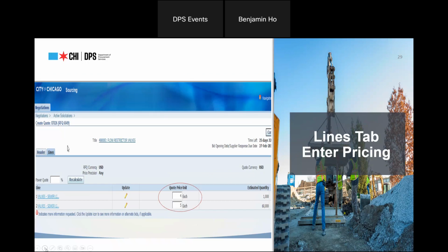It will not update the pricing as you fill in each line, so it won't do a running total. When you've submitted all the lines, then it will give you a grand total of all the extended prices, and you want to, at that point, check your math against the system's math, make sure that all matches prior to submission. Next slide, please.